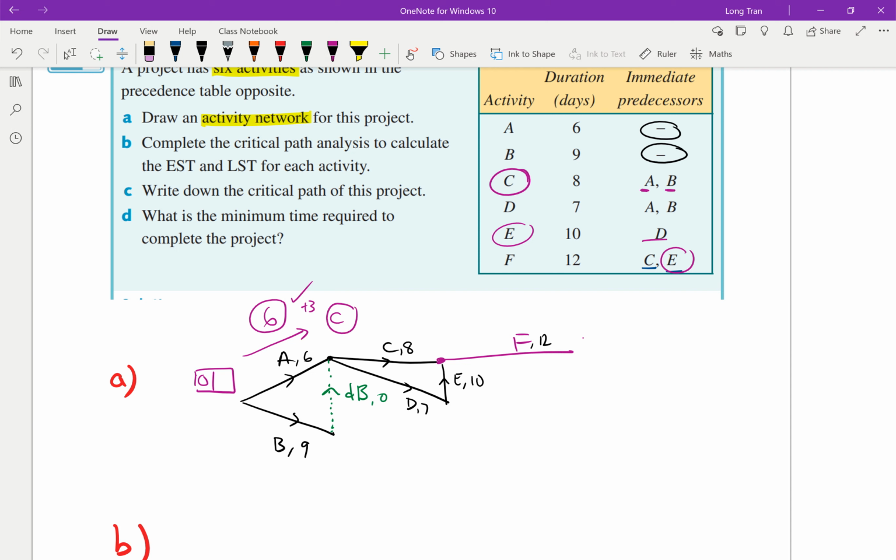So when you're doing this, you're looking for the longest time, as opposed to Dijkstra's algorithm, where you're looking for the shortest path, right? In this case, the amount of time required for C to start is clearly at least 9 minutes, assuming that B finishes exactly at 9, but that's the minimum time requirement. That's the earliest start time that C can have. They have to wait till B is done.